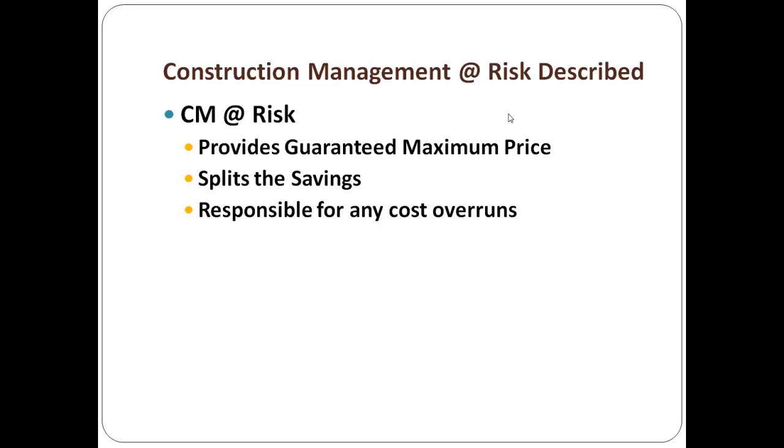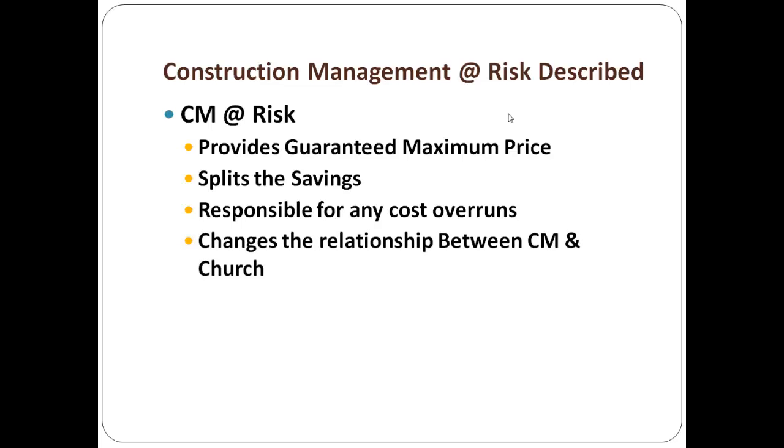He is responsible for any cost overrun. So if that building costs $30,000 more than the $1 million, the CM is going to eat it. It changes the relationship between the construction manager and the church when you do this. So here are some advantages, pros, benefits from this.